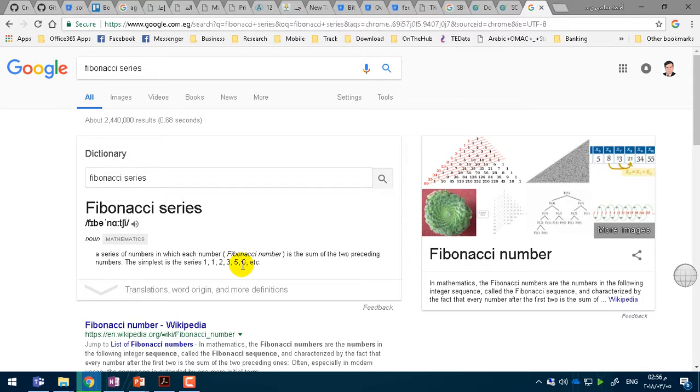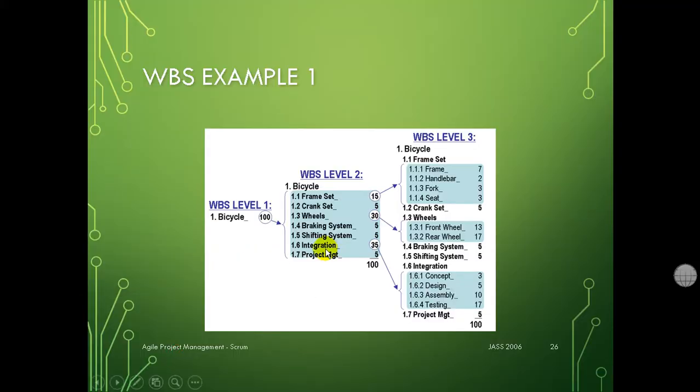As you can see, there are differences between the numbers. They're not that close to each other, which is good. Why? Not to make those horrible decisions between 2 and 3, just 5, 8, and probably you would start from that level, 3, 5, and on. We'd like numbers not to be too close to each other, so as not to confuse you about which one to choose. So these large differences in numbers are good. Here I don't think that they are using that series, right? No, they're not from Fibonacci, no.